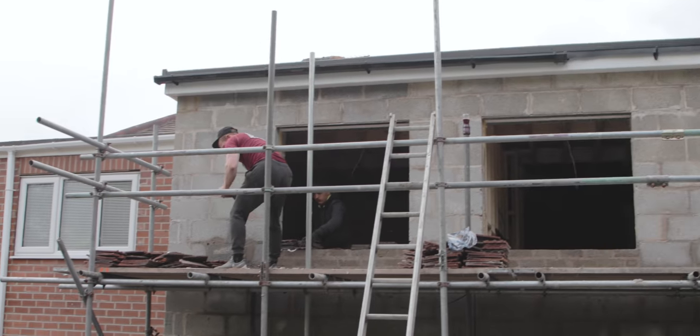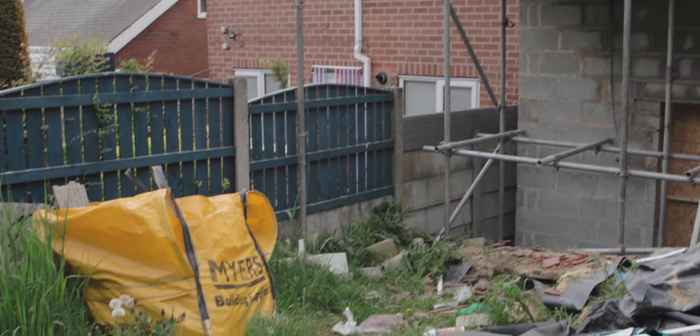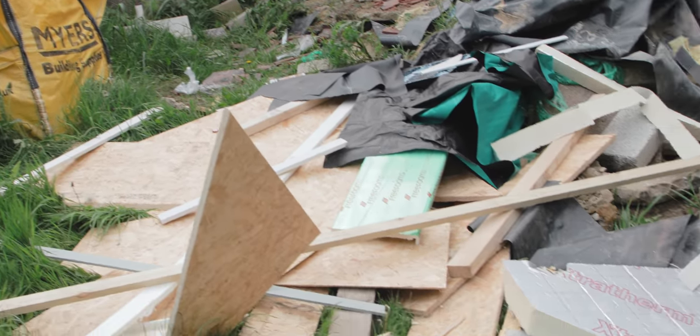Hello, my lad. How are we doing? All right. How are you? Yeah, not too bad. I wasn't expecting you this early. I've got a little YouTube going on. Nathan, scaffolder. Scaffold's getting stripped today, so roofs have got them tiny little bits of gutter to finish off up there. They can do that off a ladder. Can either scaffold down. As I said, I've got Mick and Ewan in tomorrow, over the bank holiday weekend, to do a bit of drainage. So we need that scaffolding out of the way. As soon as drainage is done, we'll get another one back up all the way around the house for my mate to start the render. Let's go.